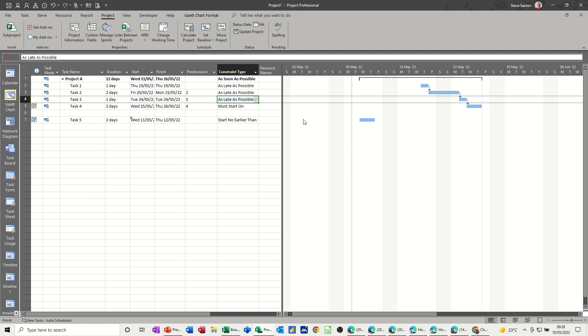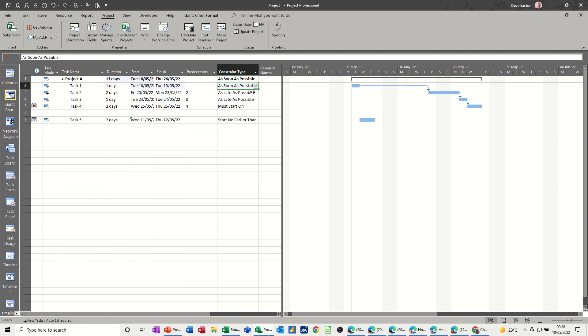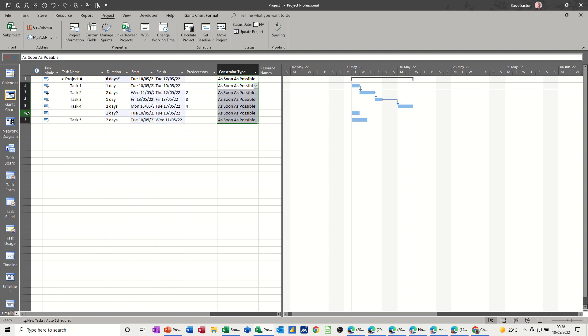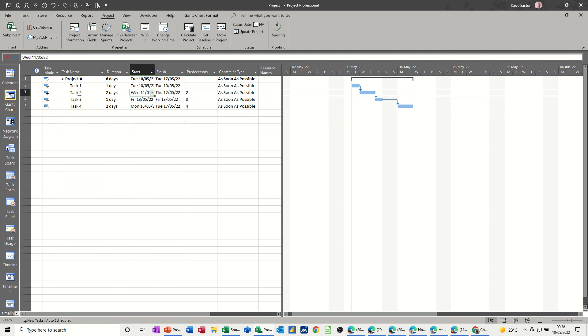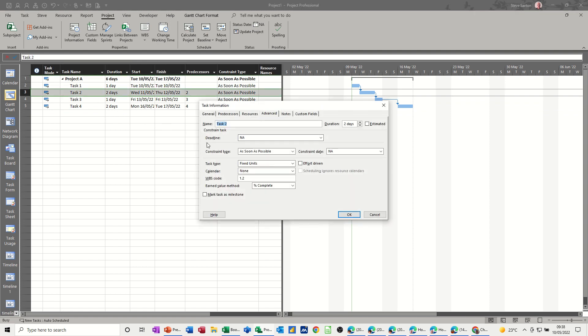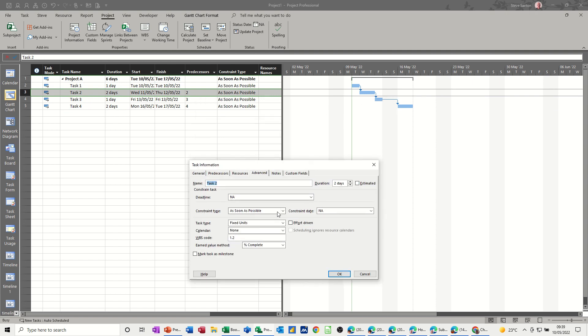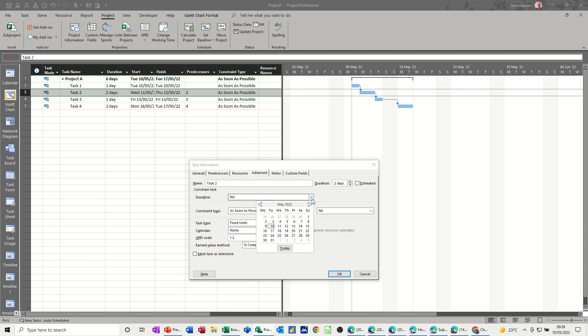Now, there is another tool you can use. If I just put these back as soon as possible, you can use what's called a deadline marker, which is a visual indicator. And it's in the same place. If I double-click on task two and this top bit here, deadline marker. So instead of putting a constraint on with all the nuances that a constraint type does, and you can either select a manual, as you saw, or you can pull this across and it does it for you. This deadline marker allows you to select a date to put an indicator on the screen.